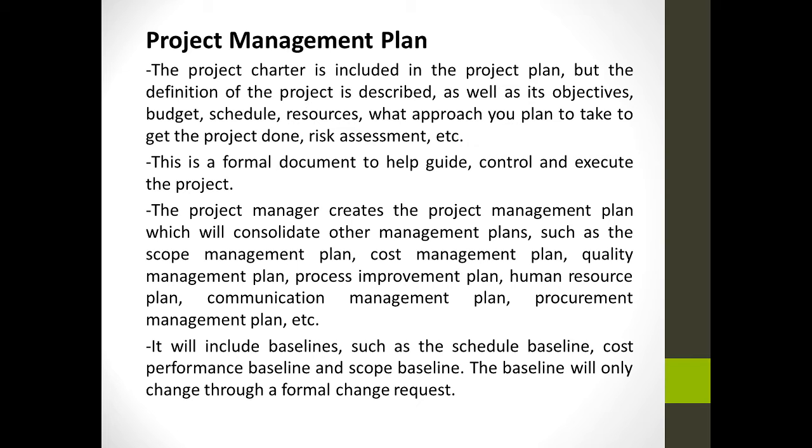Project Management Plan. The project charter is included in the project plan, but the definition of the project is described, as well as its objectives, budget, schedule, resources, and what approach you plan to take to get the project done. Risk assessments are designed in the project management plan. This is a formal document to help guide, control, and execute the project. You can use this document as a guide for your next project.